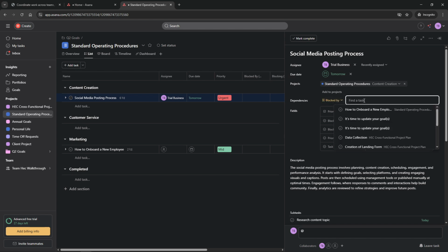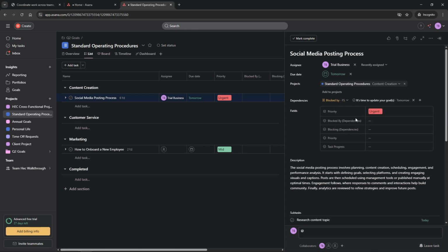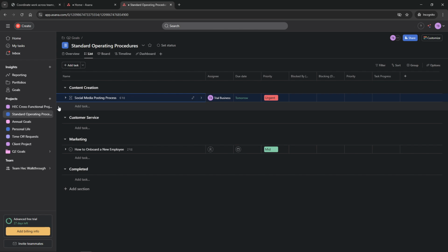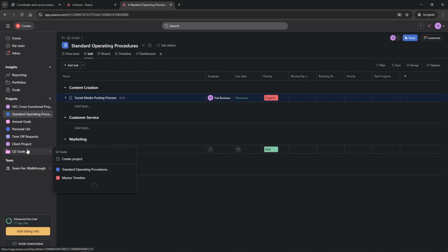Our third common misstep is the creation of multiple projects for similar tasks. While initially it might seem organized, it actually makes tracking progression a bit of a mess. To correct this, consolidate similar tasks into a single project. Use sections, tags, or custom fields to keep everything sorted and easy to locate. This strategy not only reduces clutter, but also enhances visibility into the project's progress.